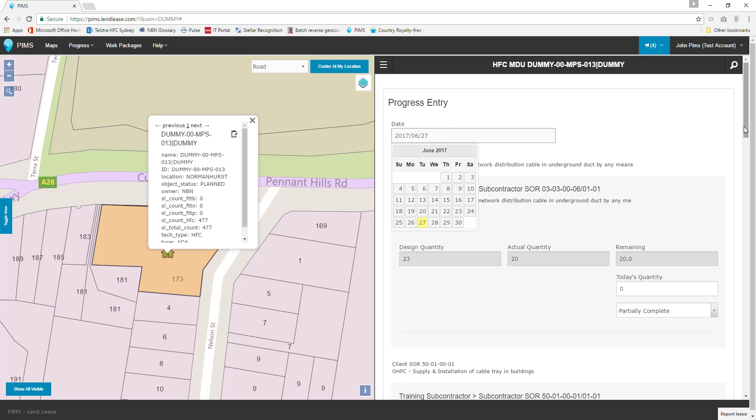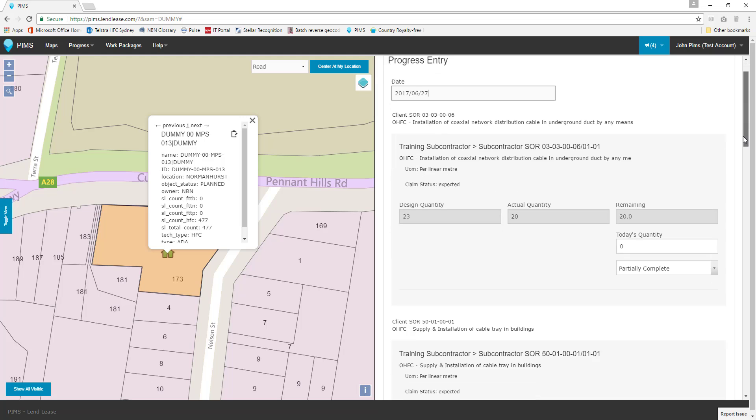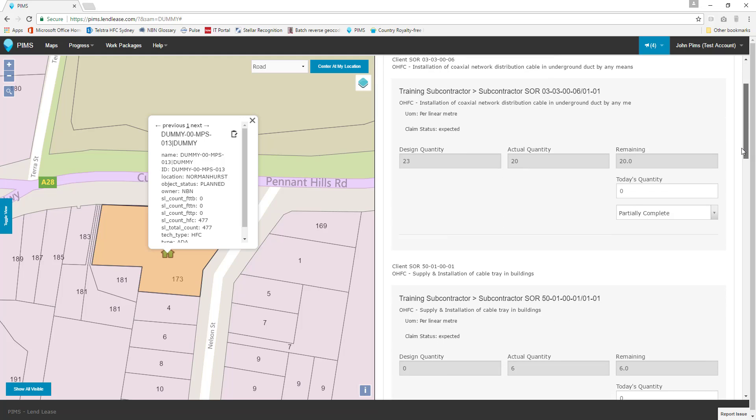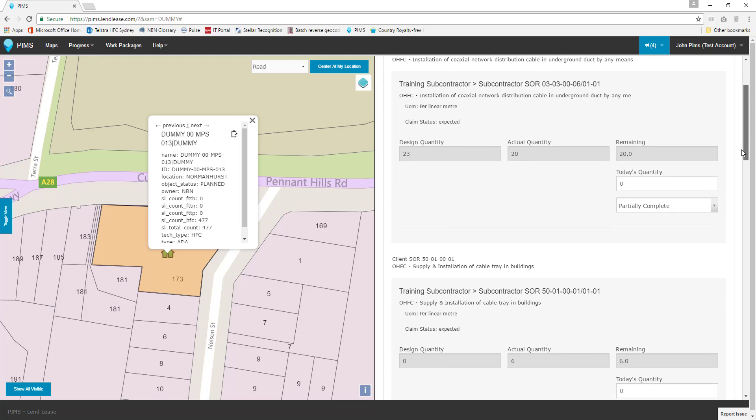Below the date is our first schedule of rates. We can see the SOR code, the description, the unit of measure, and claim status. Below this information are three locked fields that give us more details about this work. The design quantity is a fixed field describing the total of this work initially in the design for the service area.